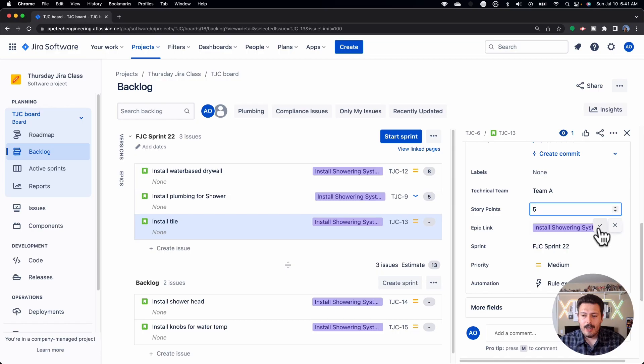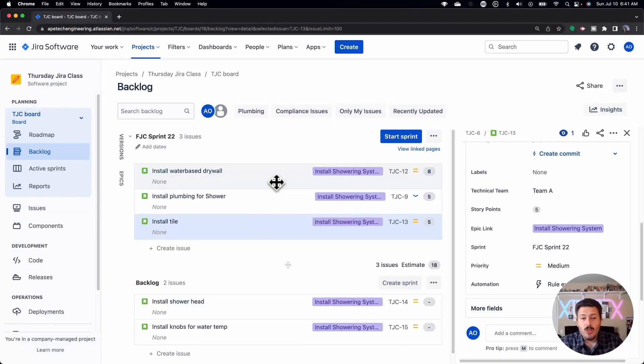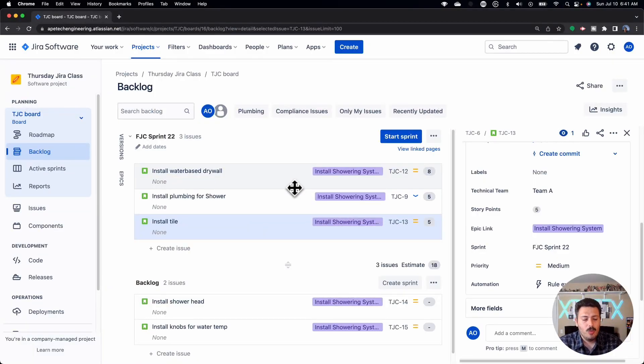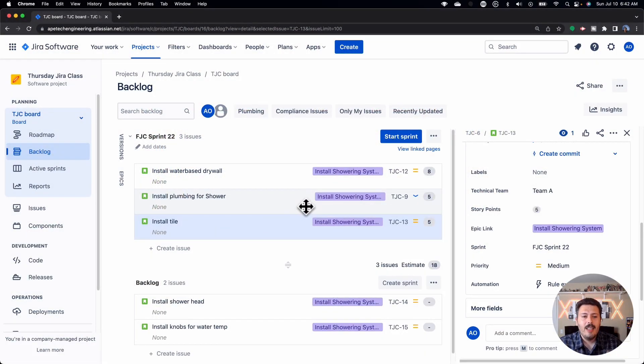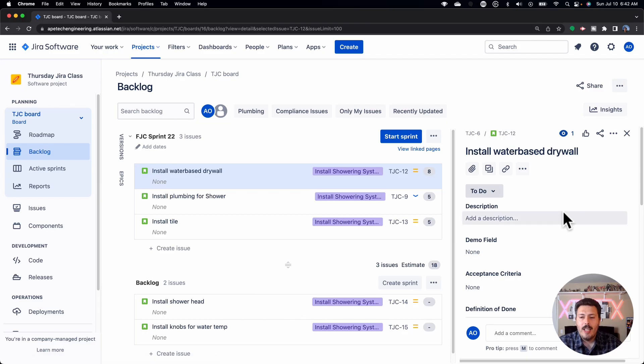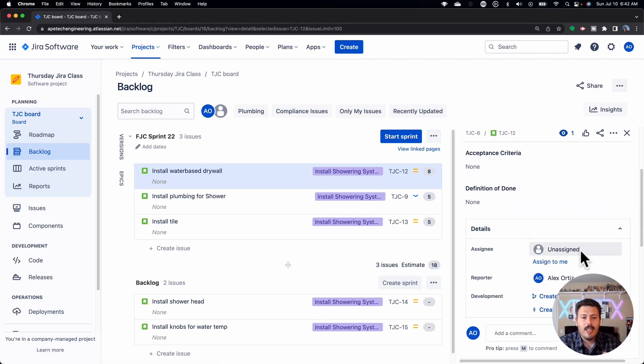An optional thing, this might be a little bit of a more controversial topic, but I personally don't start my sprints until everything's assigned out. I like to make sure that I have a person that's responsible for every story. They understand that they're responsible for that story, they've estimated that story, they understand the priority, they understand pretty much what the story is about. But I know in true Agile sense you don't typically assign issues out. You're supposed to just let the team be self-organizing. I've never personally seen that in practice actually work. Most people are skilled in a very specific part of the system, and I have over my 10-year career here doing Agile, I never really witnessed anybody know how to do everybody's job to the point where you can just cherry pick whatever story. So I typically will assign the stories out during the sprint planning.